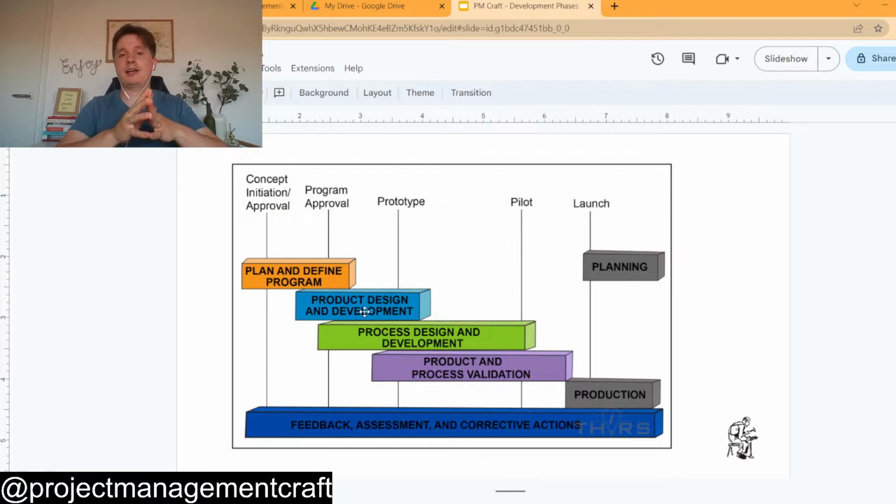And when you're looking at process design, you're going to have different types of requirements. For example, you are going to have FMEA analysis, simulations. You are going to have a prototype phase where you're going to really build something that's more representative of mass production. What's the difference between your initial concept, for which maybe you have only a simulation, and this prototype? This prototype needs to reflect much more closely what needs to go to serial production.